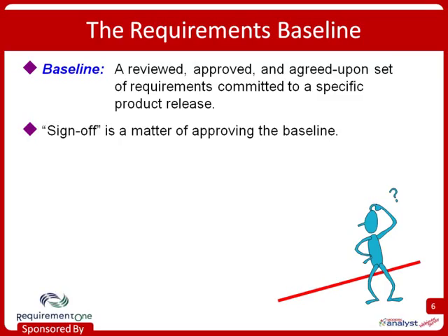And here's my proposal for what signing off or approving a baseline really ought to mean. You know, what people are saying with their signature. It might be something like this. I agree that this document represents our best understanding of the requirements for this project today, and that the system described will satisfy our needs. The second thing is that I agree to make future changes in this baseline through the project's defined change process.